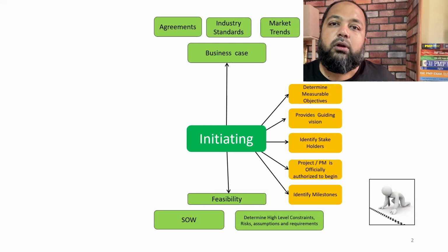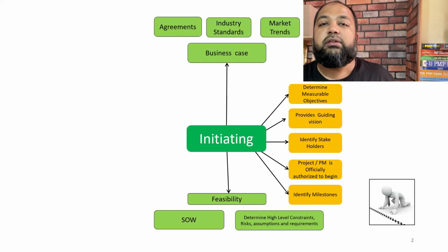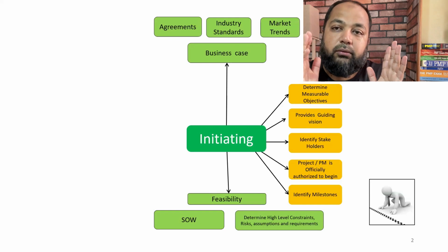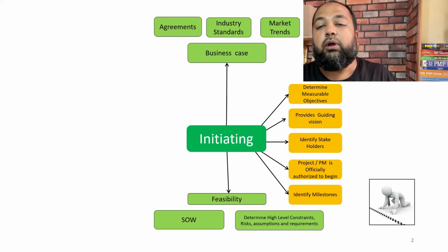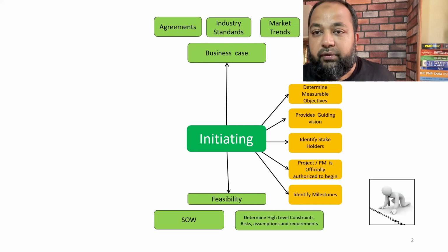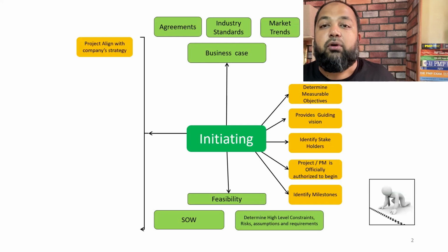What are the milestones on a project, right? Probably you want to give milestones based on the deliverables, like for example end of discovery is a milestone, then end of two sprints is a milestone, you have a release after that, or end of UAT is a milestone, right? Or end of release one is a milestone, or end of MVP is a milestone. You talk about all of these things in the initiating phase, and then you call this out.